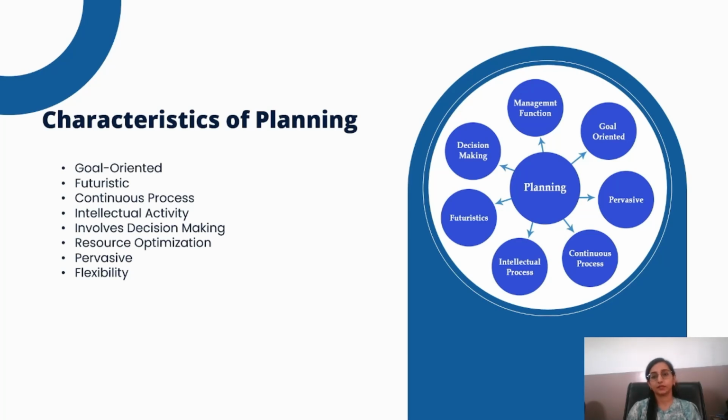Techniques such as resource leveling and resource smoothing are commonly used to manage resource allocation effectively. Resource leveling aims to minimize fluctuations in resource use by maintaining a steady workload, while resource smoothing adjusts the project scheduling to apply resources more evenly.